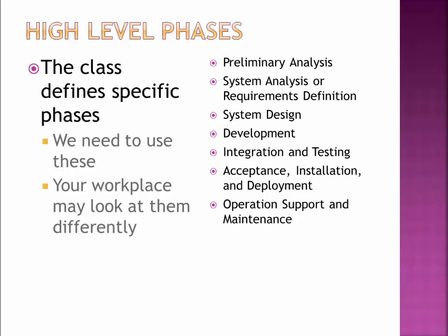But outside of the most extreme of project plannings, you will have some level of plan that comes along. You might not get to the same level of the WBS we'll show here because there might be some assumptions, like, hey, when I do, for example, a cycle, I'm going to do X, Y, and Z. And every time I do this cycle, I'm going to do X, Y, and Z. And so I don't need to spell X, Y, and Z out every time. I might just do it at a sprint level. And so within a sprint, I know I'm going to do some design, some tests, some code, some other pieces that are going to go on inside of there. I don't necessarily have to go through each sprint and define the activities happening inside of it if you're taking an agile approach. But that's okay. We still have these high-level phases that help us define.